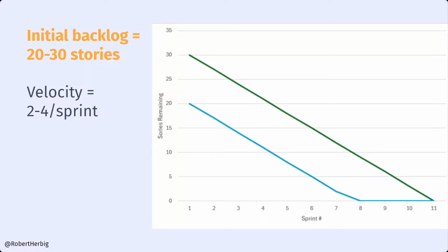Tech debt. Often you find tech debt that really does justify being done, and that can result in a larger backlog. And so what's actually not too uncommon with these burn down charts is not to see a simple straight line, but instead see a straight line, and then it jumps up a little bit as new work is discovered. Or it might level off, which is work getting done and discovered at the same time, right? And these kinds of things are not well captured.